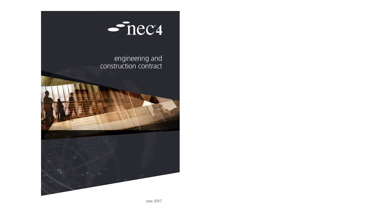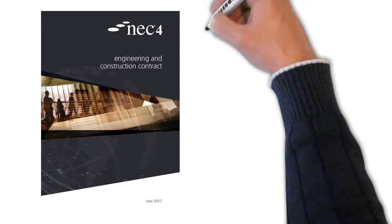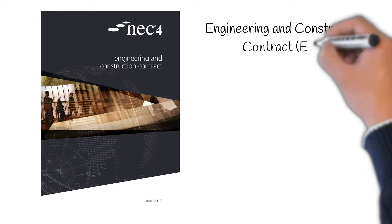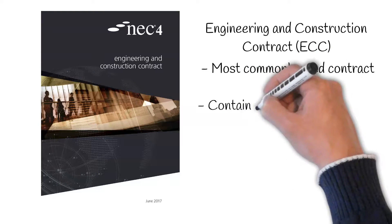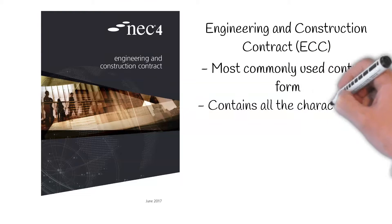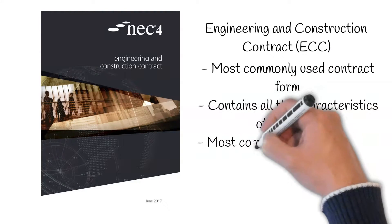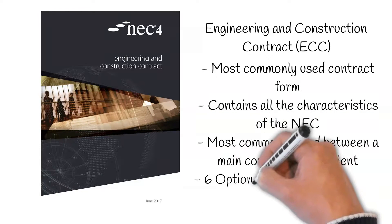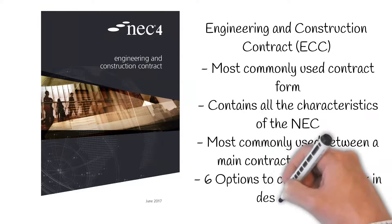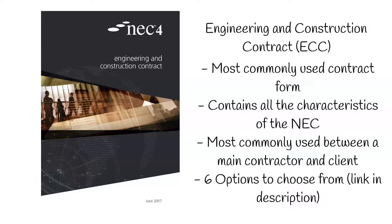The contract forms which fall under the NEC are as follows. Engineering and Construction Contracts, or ECC. This is the most commonly used contract form and contains all the characteristics of the NEC. This contract is mostly used between a main contractor and a client. Within this contract, there are 6 options of which the employer will choose what they believe will achieve the best value. If you'd like to know more about these options, there will be a link in the description of this video.